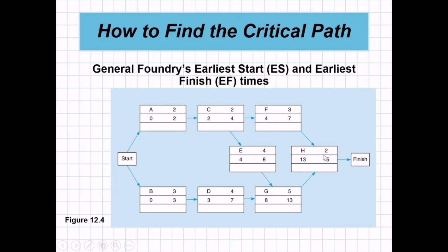So in other words, if we follow this critical path, the network can be completed in just 15 weeks, given that some activities are done simultaneously. So we do not wait 25 weeks, but rather we can finish it in 15 weeks.